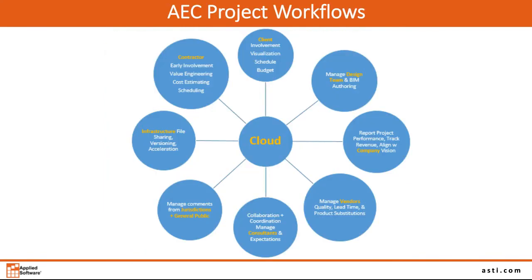One of the things that's making collaboration much more effective, if it's taken advantage of these days, is the cloud. By putting models in the cloud and other digital data in the cloud, you have a single source of truth. You don't have multiple versions of it flying all over the place to different people. When you need to update something, you simply push the new version up to the same cloud repository, and all the other players see it immediately.